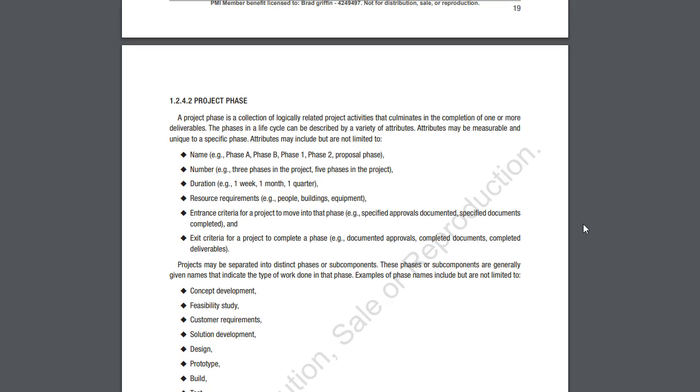Do you just sit down and start typing, or do you create an outline of your thought process? Those are the phases, and one phase leads into another phase. Very similar to a project. If I'm going to build a highway, the first thing I do isn't go out and start pouring concrete. I have to do all the dirt work, and that has to be done before I can start organizing for other pieces.